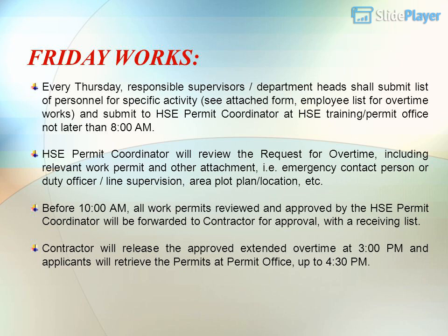HSE Permit Coordinator will review the request for overtime, including relevant work permit and other attachments, i.e. emergency contact person or duty officer, line supervision, area plot plan/location, etc. Before 10 a.m., all work permits reviewed and approved by the HSE Permit Coordinator will be forwarded to the contractor for approval, with a receiving list. Contractor will release the approved extended overtime at 3 p.m. and applicants will retrieve the permits at the Permit Office up to 4:30 p.m.